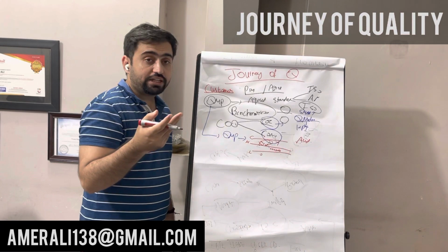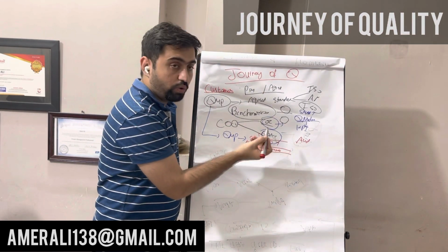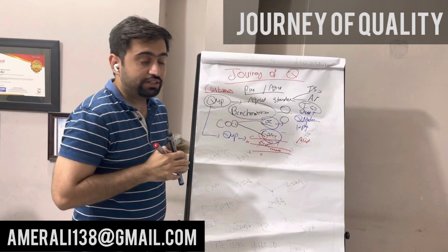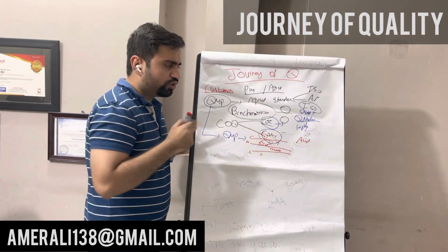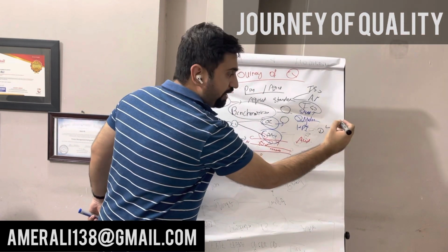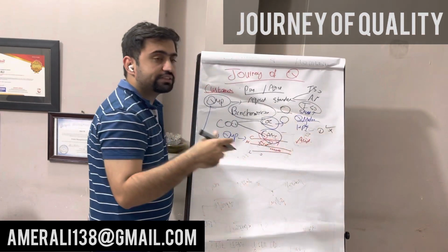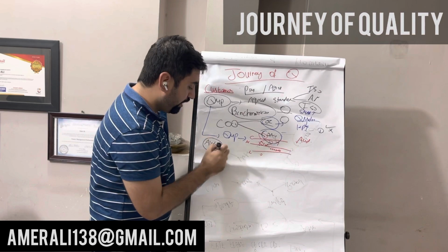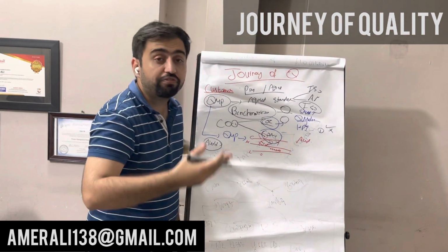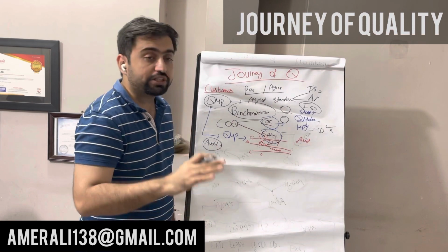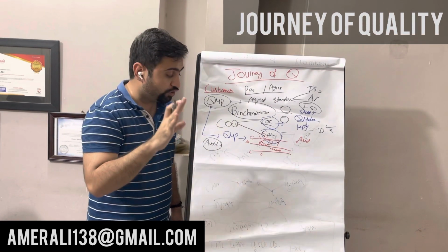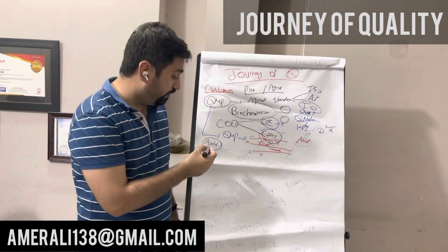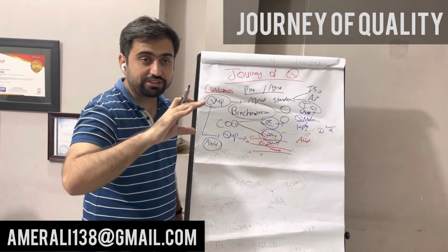So how can the process go out of control? Either the points go outside the upper or lower control limit, or 7 consecutive points are on one side. That's the control chart for you. You can also use a checklist, like is this present or is this not present. All those things are to check the process, to ensure the process. A major tool that you make sure you implement is the audit. You check the effectiveness of your process. You make sure your process is effective, your process is giving you the right result. That's all which happens in audit, and all those things happen in manage quality.